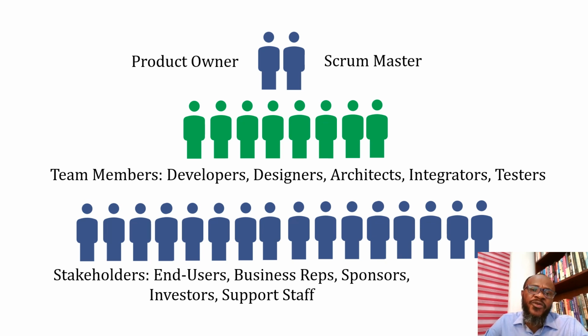Now, the reason we prefer T-shaped skilled members is to avoid what we call single points of failure. Single points of failure is any situation where if one component is absent, the rest of the components fail to work. Okay, so by extension, when we are applying that concept to the human resource, what we mean by single point of failure is that if one team member leaves, it means that the whole work comes to an end. It comes to a standstill, and the team is not able to move forward. That happens when you have only one person who can do something, who is able to perform certain functions.